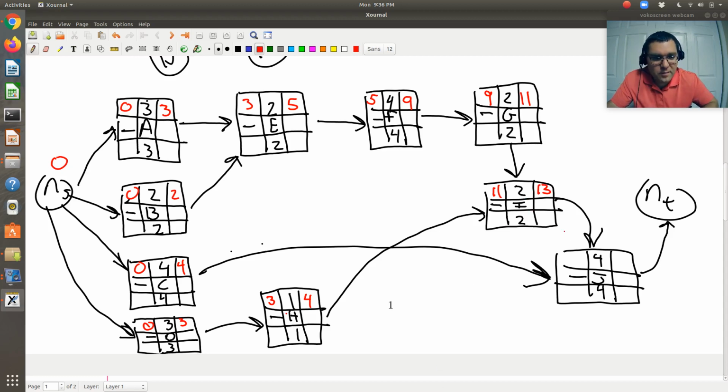Okay, so then if I go to J, J has a precedence of I and C. Earliest possible finishing time of C is 4. I is 13. So the earliest possible starting time for J is 13. Has a duration of 4. So its earliest possible finishing time is 17. Okay. Then that takes me to my terminal node. And so we find then that it's going to take 17 weeks to complete the project. So this is going to take 17 weeks.